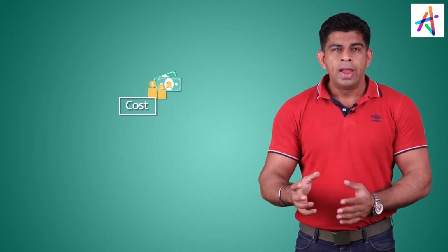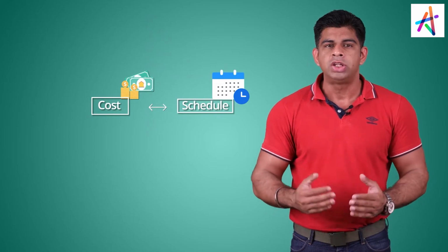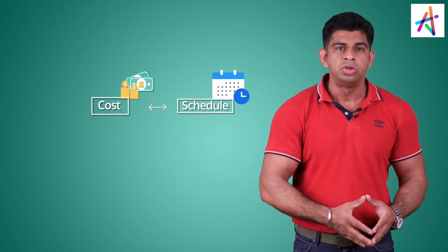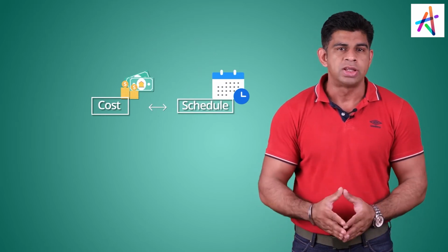And then that's how you will plan for the total duration, but you also need to plan for something else, which is cost. Cost and schedule works very similar. So this is like when we teach the schedule chapter, cost chapter becomes the revision of the schedule chapter. The tools and techniques that we have for the cost chapter are absolutely same. Just like we define the activities and estimate the duration, here we define the activities which is done now already, and then we estimate the cost instead of estimating the activity duration.